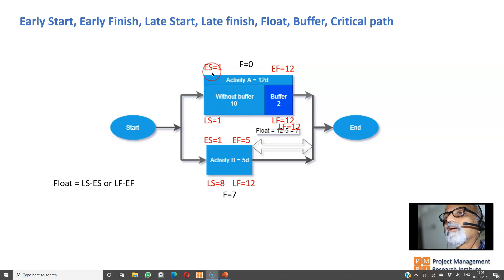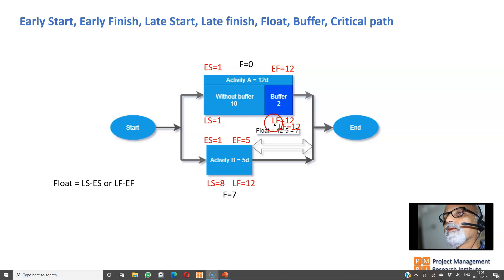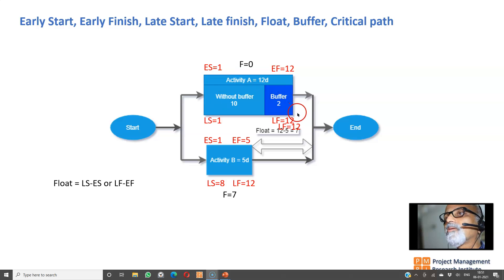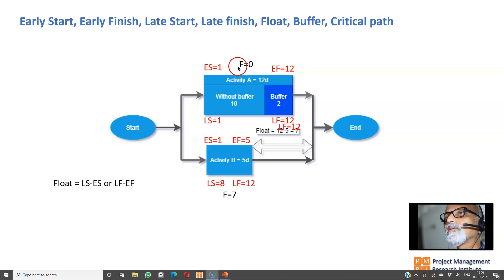For Activity A: early start is 1, early finish is 12, late start is 1, and late finish is 12. Float equals late start minus early start, or late finish minus early finish. For Activity B, that is 8 minus 1 or 12 minus 5, which equals 7. So Activity B can float around for seven days without affecting the end date of the project.